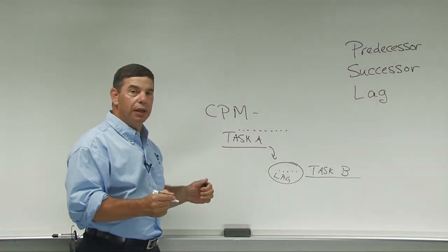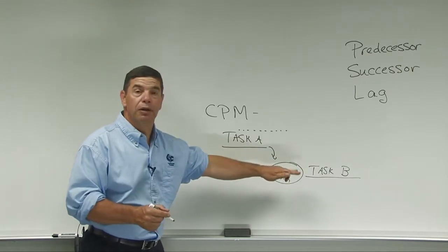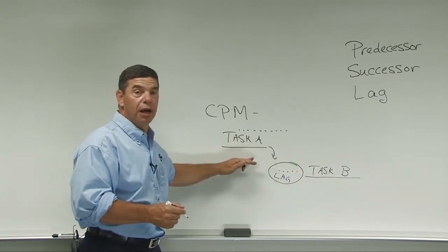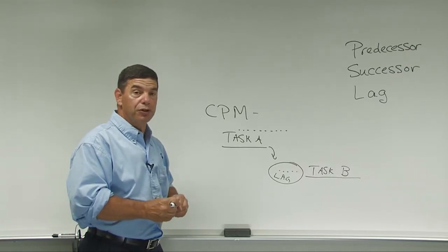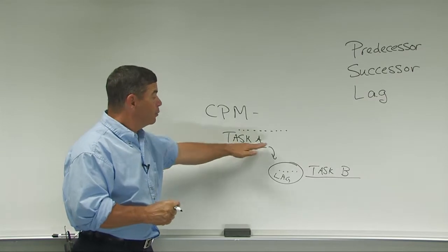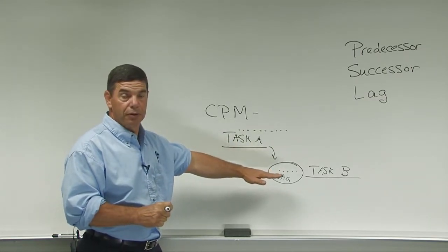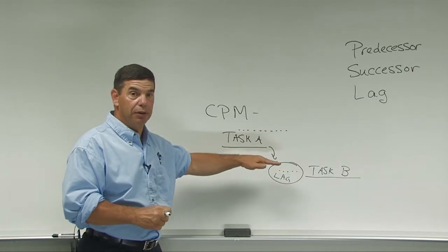Most scheduling is done using days. So our tasks are in whole days, not half days, not hours, not minutes. Sometimes if we're doing a shutdown project, the tasks might be in hours. But most of them are in days. Not all tasks, though, actually take up time.